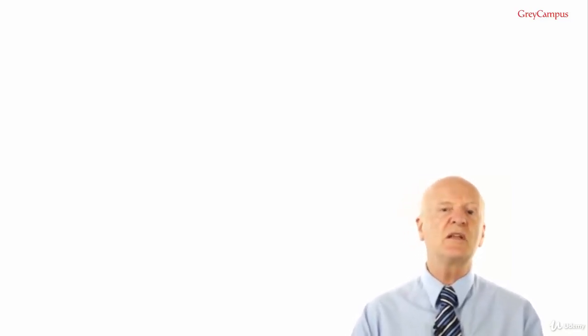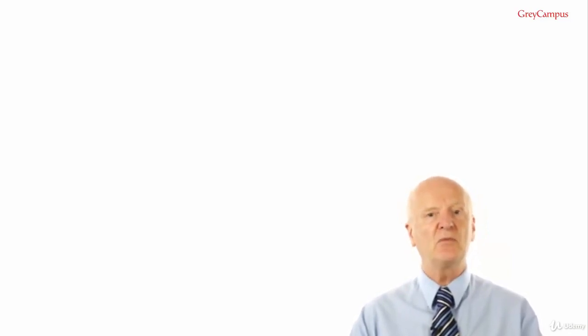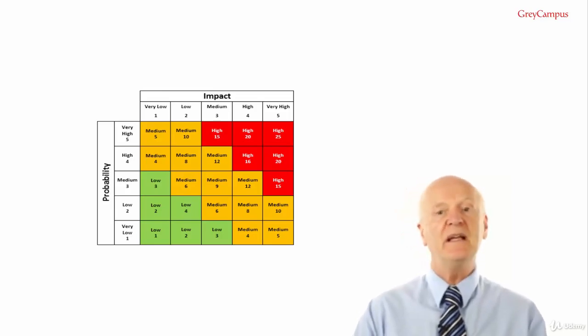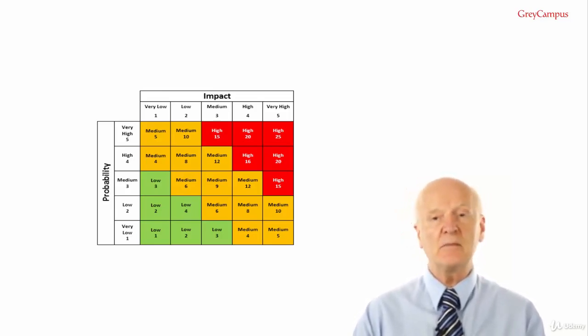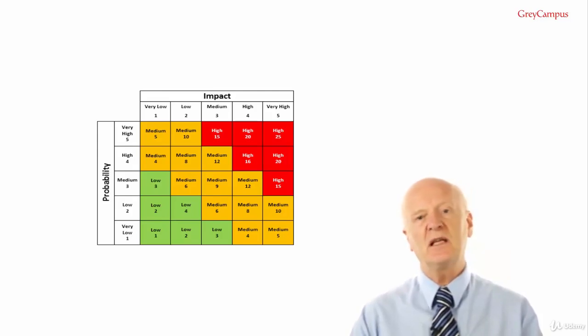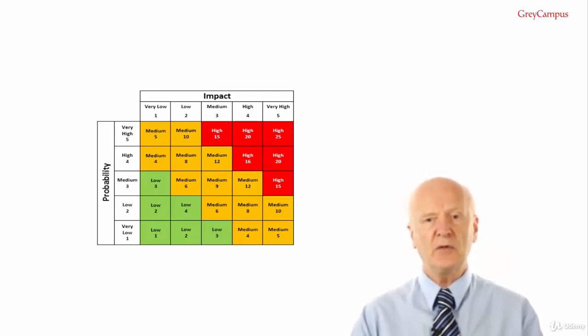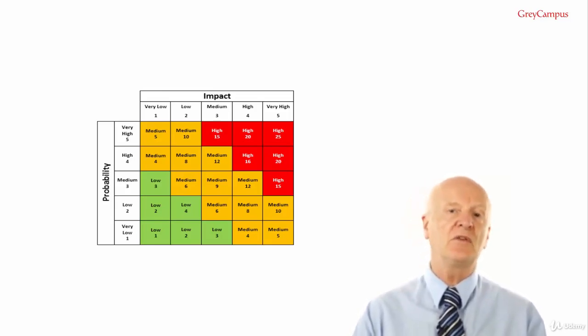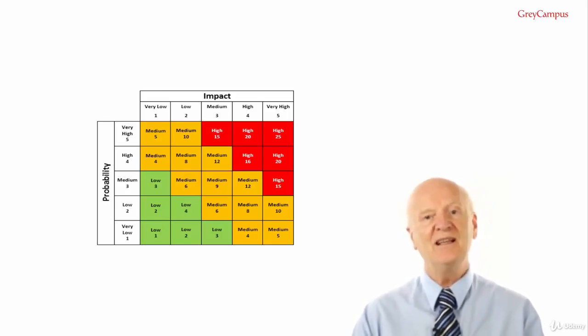The way to improve the situation is to add simple numbers to the words in both the probability and impact, and we use 1 to 5 for each, or simple decimal numbers, and you'll now have 14 possible ratings instead of just 3. If I've counted them correctly, that is. That's 1, 2, 3, 4, 5, 6, 7, 8, 9, 10, 12, 15, 16, 20 and 25. That's not 25 options because there's no number 7, 11, 13, 14, 17, 18, 19, 21, 22, 23 or 24.